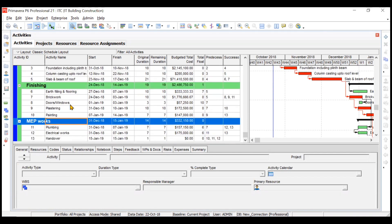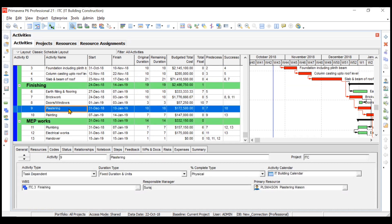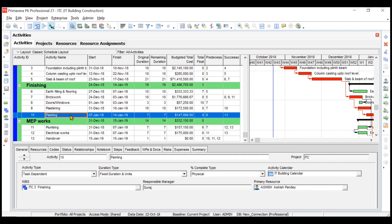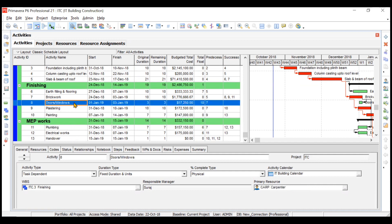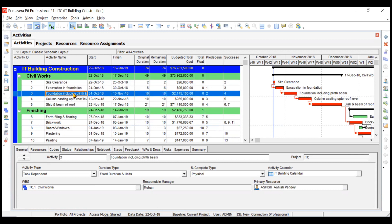But suppose, for example, brickwork and plastering are being undertaken by a particular subcontractor whose name is, let's say, PQ Services. Similarly, painting and doors and windows is taken by some other subcontractor. And site clearance and excavation are taken by the internal team of that particular company for which we are executing the project. So now if I want to segregate the activities being undertaken by a particular subcontractor, the only way is by assigning activity codes to them.